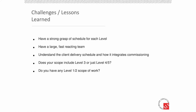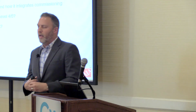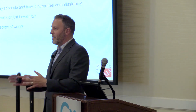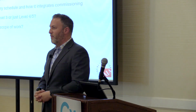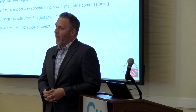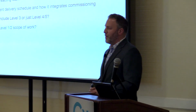So the last thing before we head into some Q&A will be some of the challenges and lessons learned that I've encountered throughout my career, not just recently. Have a strong grasp for the schedule of each level. That's the hardest thing to understand when you're talking about a delivery method of 9 months. 3 of those months are actually in the factory, so you're only talking about a 6-month build where the power module and all the other components are brought together. A month and a half of that is your level 4 and level 5 commissioning. So you've really only got about 3.5 months of construction that you can observe in the field that matter for your MEP systems. So you have to understand how the nuances of all those levels play together and where you want to focus your time.